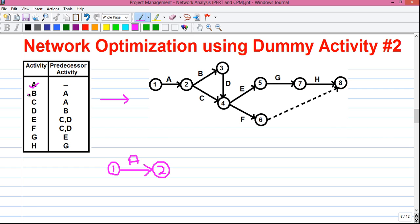Next, activity B which has the predecessor activity of A. That means it can be started after activity A is completed. So activity A is finished at event two. So from event two, we can draw activity B, and B is ended at event three. Next, activity C which has the same predecessor activity, that is A. That means it will again start from event two. So this is activity C, and it will end at event four.